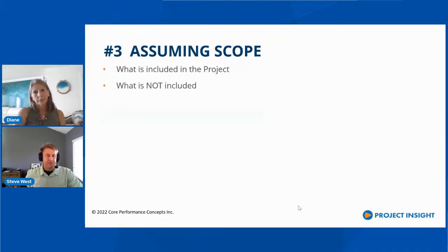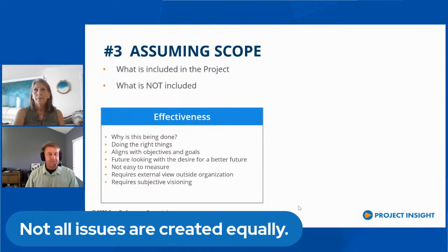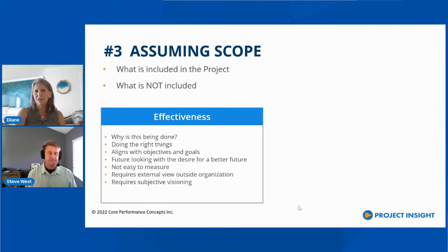Well, do you leave a little bit of a slush fund in your project planning? Absolutely. You have to have your contingency. And is there a percentage that you recommend? Like, if I have a $1 million project, should I have $200,000 worth of additional slush fund? Is it like 20% more, or is there no rule of thumb? I would say do some analysis on your own organizational projects, because there are probably tendencies. For example, in construction, there's always this 20 to 25% more, because stuff comes up.